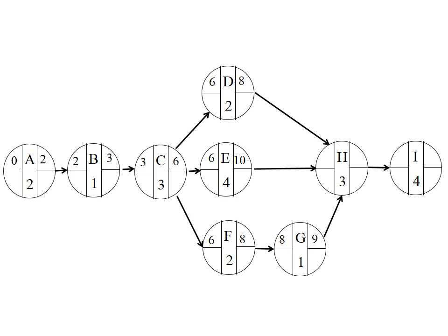Now this is where you need to be careful for H. What is the earliest you can begin activity H? The earliest you can begin is either 8, 9, or 10. What do you think is the answer? Is it 8? No, because if you put 8 there, remember activity E and G would not have been completed. Therefore, the earliest you can begin activity H is when all preceding tasks are done, and that will happen at 10. So moving forward, whenever you have this kind of choice, you select the largest number. And you will complete this at 13, begin I at 13, and complete this by 17.